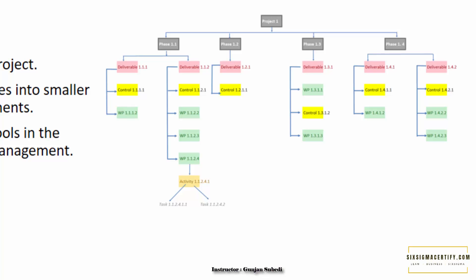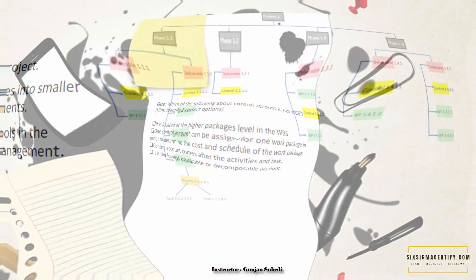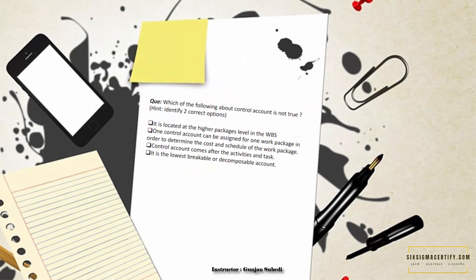Each work package in the WBS is assigned only one control account, shown in yellow in the diagram. We can get important information about milestones, cost, and schedule allocated through the control account. Whenever we want to learn about any work package, we look for its corresponding control account. The control account may cover one or more work packages and can be used to estimate cost, schedule, and scope.